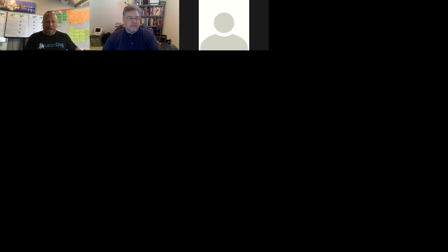So again, the way this works, you have your product owner, business analyst. They're sitting in a room. They're talking about the user story card. They're saying, as a user, I want this so that I can do this. Developers, testers, everybody is in the room. The entire team is in this planning game, but the estimation is actually done by the developers. And I'll come back to that as to why only the developers. So they'll read the card. Everybody will take their cards. They'll do the thing. We'll do the flop.